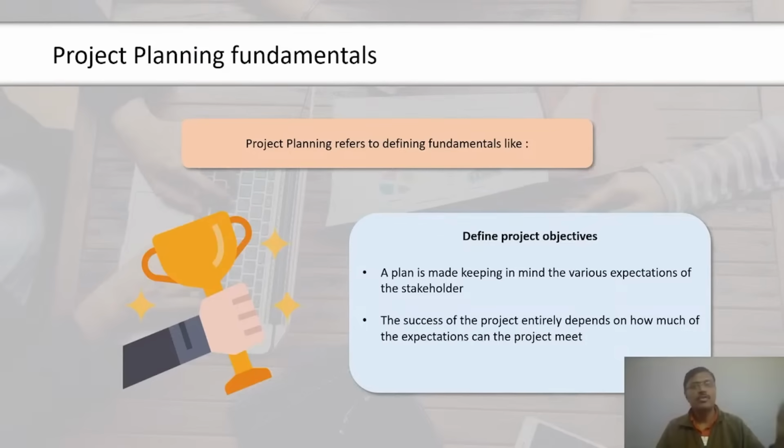To accomplish quality planning, first, analyze the benefits versus the costs of meeting quality requirements. Next, identify the cost of quality and confirm if that investment in quality is justified. In addition to these, benchmarking helps in analyzing the quality activities of similar projects executed in the past. This helps in identifying the particular quality of output of the project, which in turn acts as a basis for the current project's quality planning.